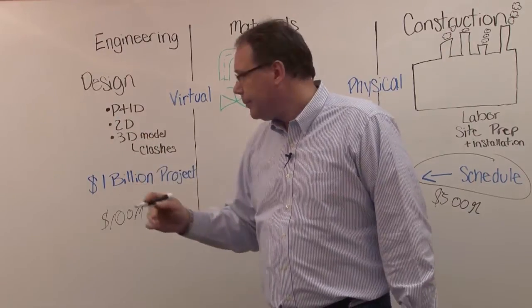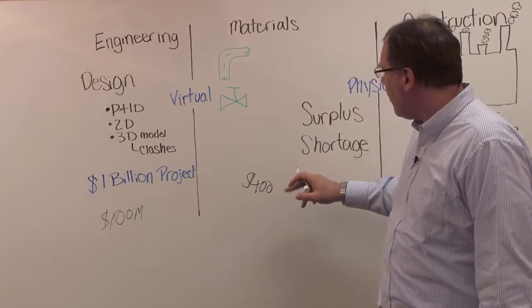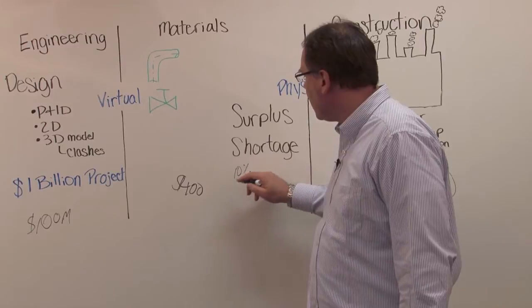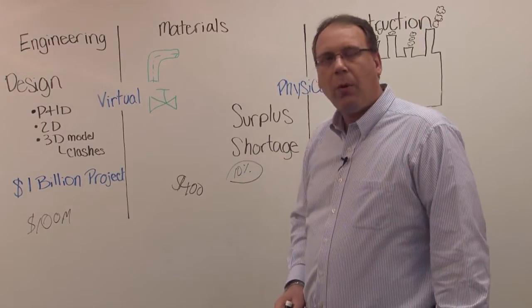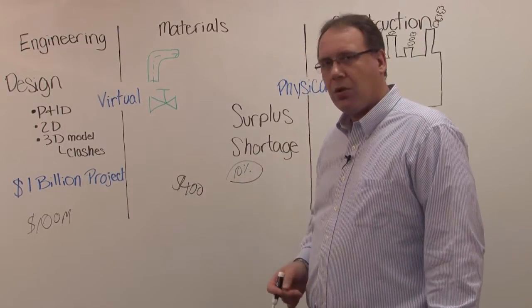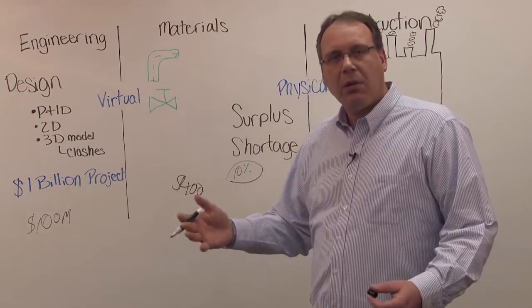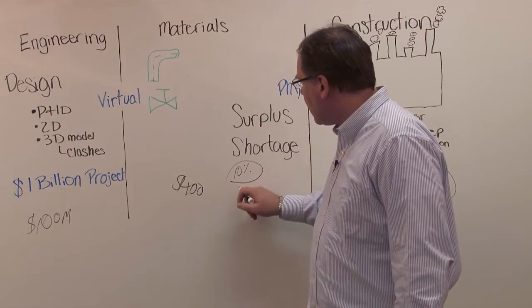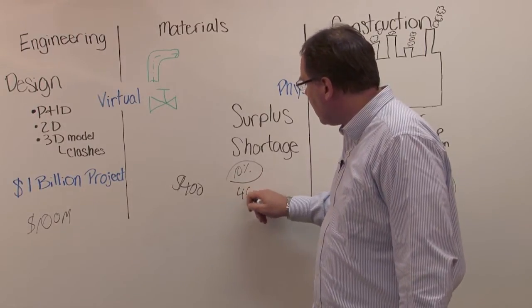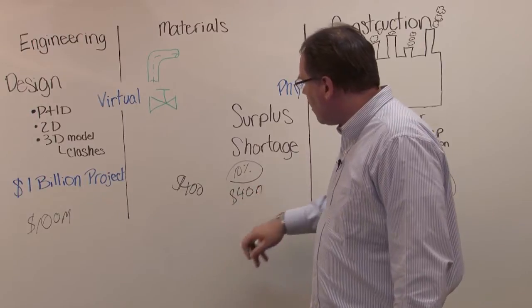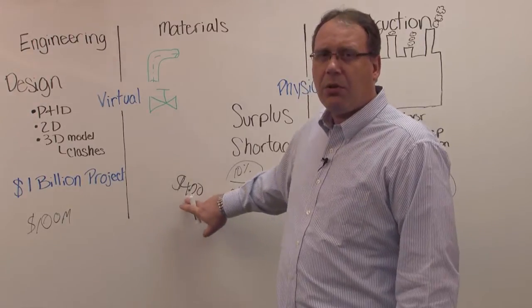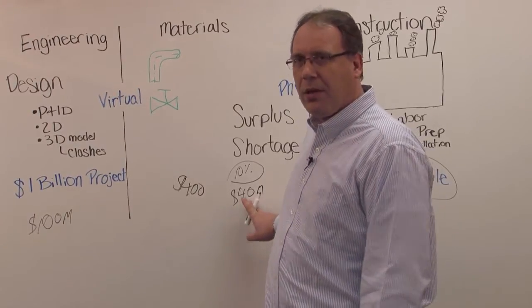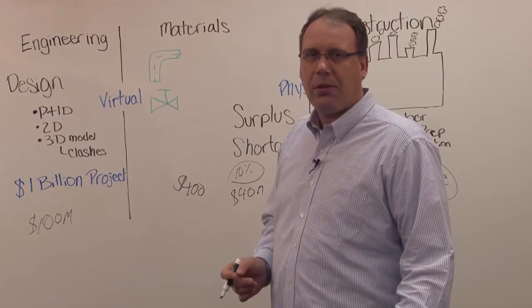For example, a normal surplus can be perhaps around 10% of surplus in the normal way when you do the execution without really a robust materials management system. So 10%, that's 40 million. Of the 400 million of the material costs, they're spending 40 million on surplus, just to make sure that they have always enough materials there.